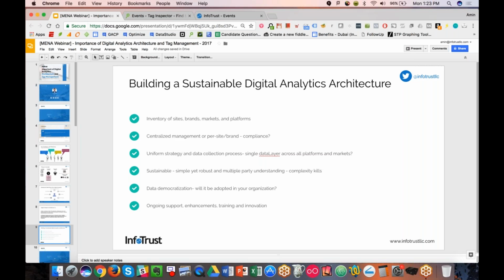We recently rolled out an analytics architecture with an organization that has many different platforms and hundreds of different attributes they needed to collect. But really the core for buy-in from all their markets or regional teams was just conversion tracking, a completed order or purchase tied to their marketing advertising. That was the core. That was enough for them to understand, yes, we can make decisions off of our analytics tool. So getting that focus and deploying that first built all sorts of trust.